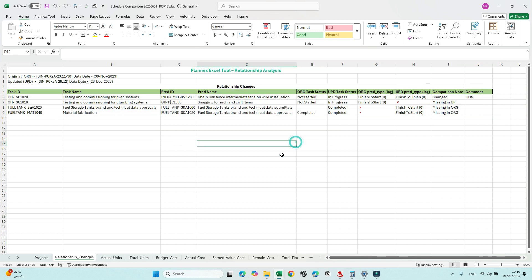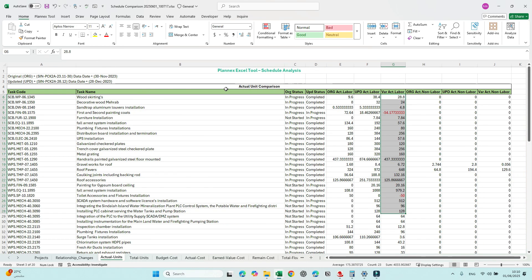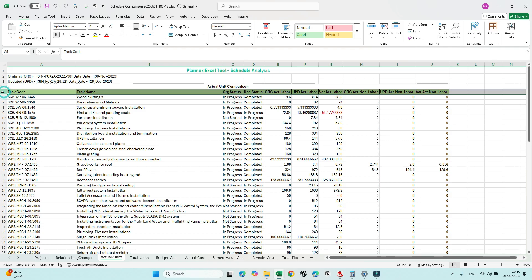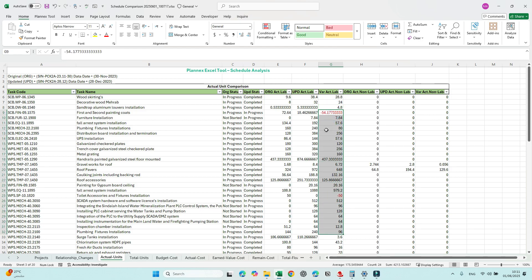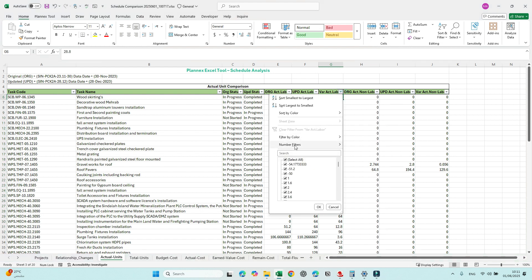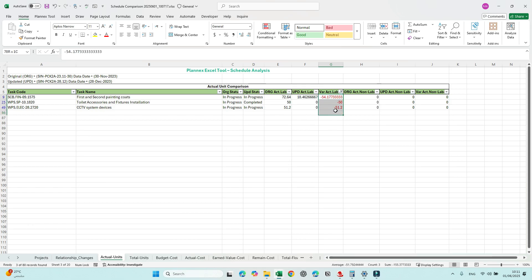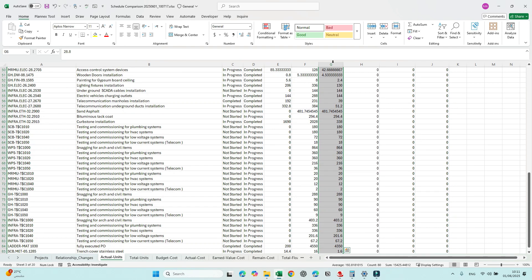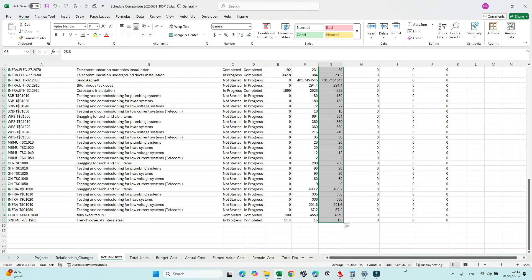Next is the Actual Units section — this compares units, whether labor or non-labor. If we select this row and press Control+Shift+L on the keyboard, we can apply a filter. Values shown in red mean the variance is negative, which should not be the case. Filter by color to get those three items and add a comment justifying the issue — maybe this is a wrong progress entry from earlier. To know the overall progress this month, select the submission column; the total there represents the total progress for this period.